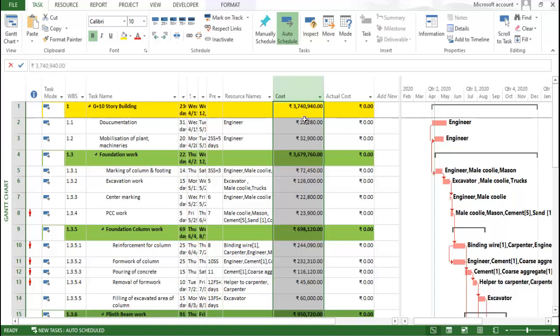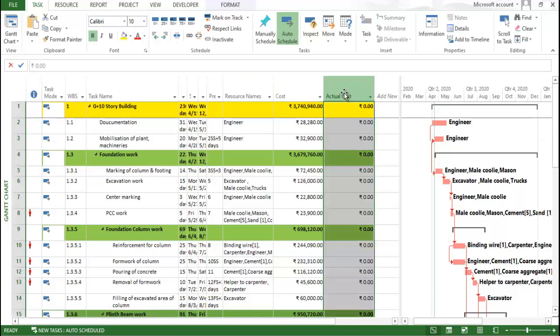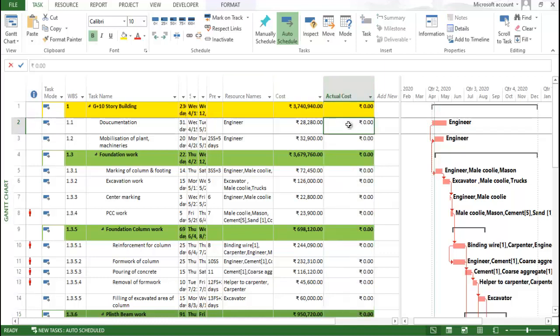And you required 100 rupees to complete the particular task. So, it means that 80 minus 100. Like estimated minus actual cost, that is called as a minus of 20 rupees which is the cost overrun, which is a variance of minus 20 rupees. Now, let's come to the entry of the actual cost. It is not that easy to put cost over here. Whatever the actual cost incurred for the project or any particular activity you cannot directly enter here because it is not editable.